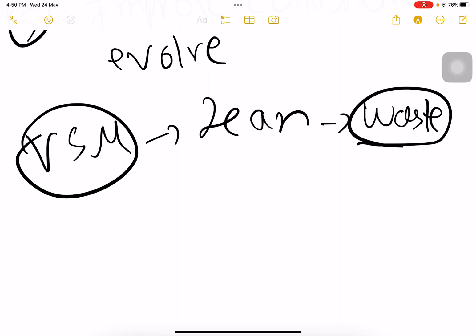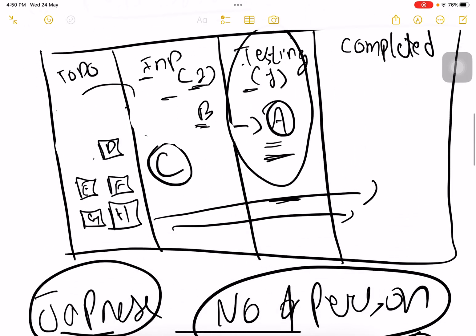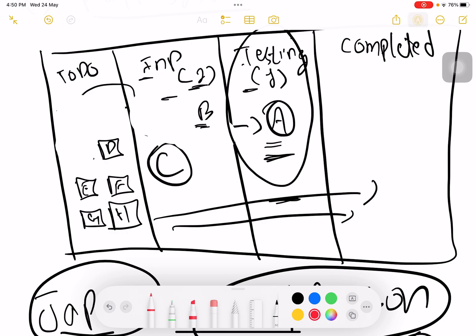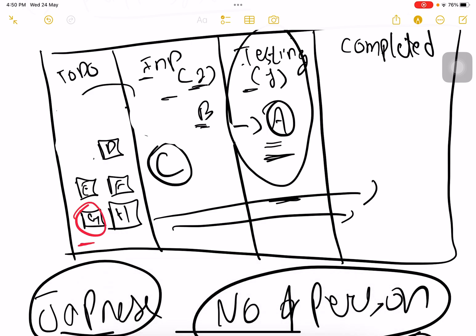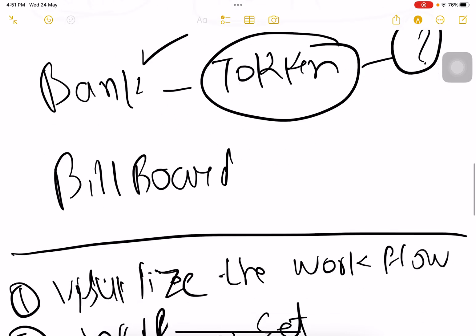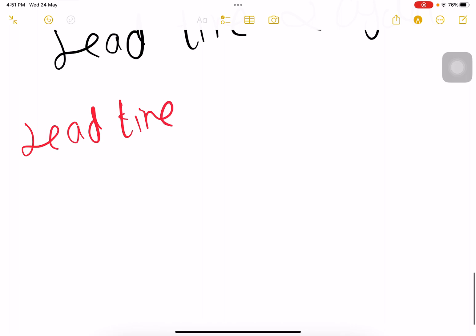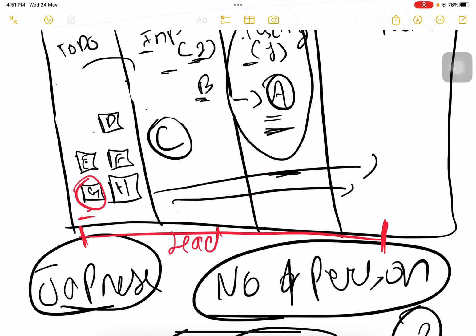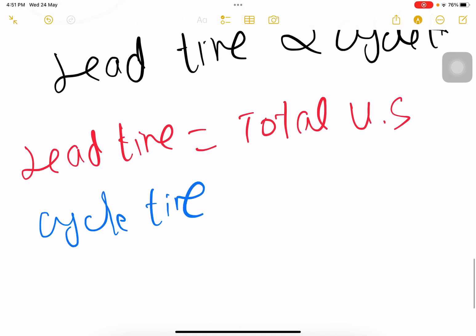What do we do? We consider lead time as well as cycle time. Lead time is when the user story was requested to when it was completed - total time of a user story. Cycle time is when the team started working on it to when it was completed. So which one is greater - lead time or cycle time?